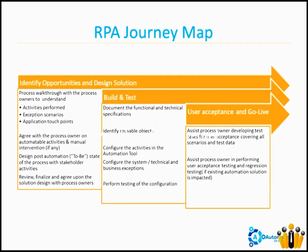After testing, it will go for UAT — User Acceptance Test. In UAT, the people who were previously working manually on the process will test your solution, verifying it performs as they used to do manually. They will be given a period of two to three weeks for UAT. If any errors or bugs come up in that period, we will fix them, and then it will go live. At go-live, we will have four weeks of warranty support.